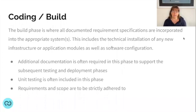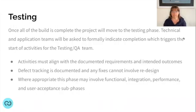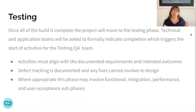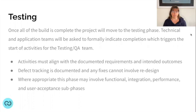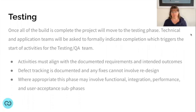Once the build team has signed off, you move to the testing phase. Activities tested must align with the documented requirements and intended outcomes, so the testing and QA team refers back to the requirements and design specification documents. The testing phase involves functional testing across modules, integration testing through connected systems, performance testing in some cases, and user acceptance testing depending on the size of the project.